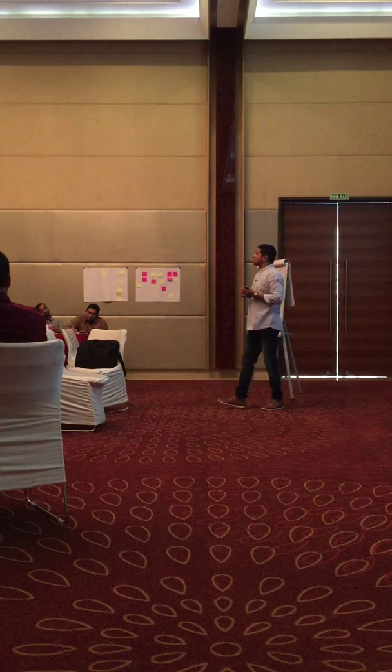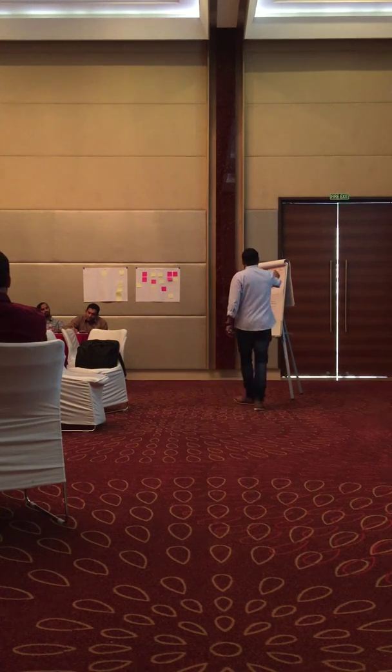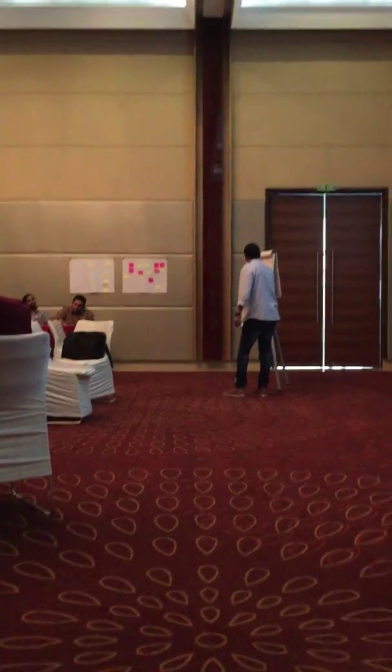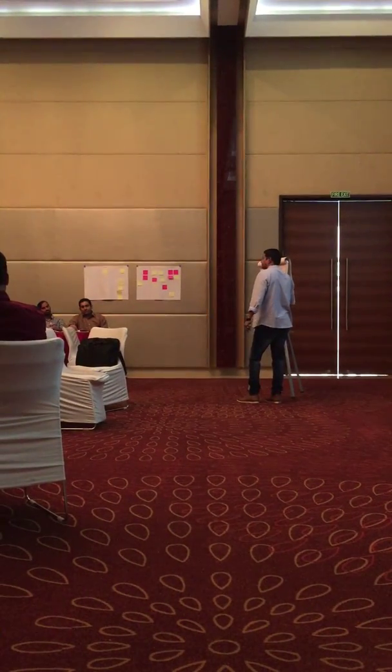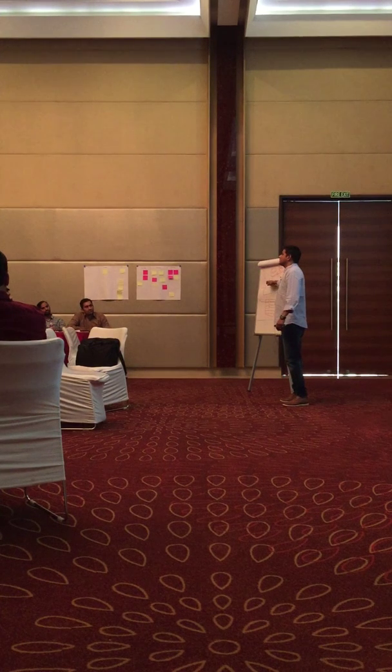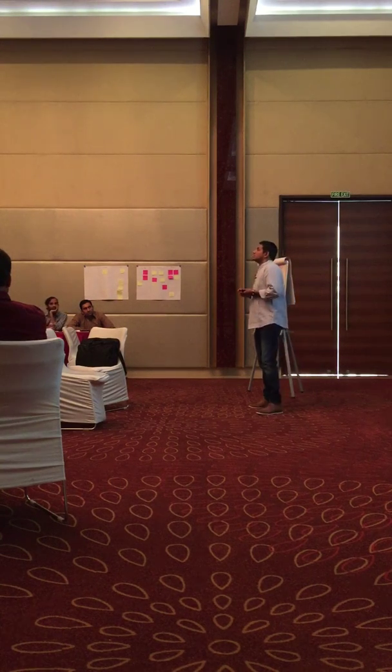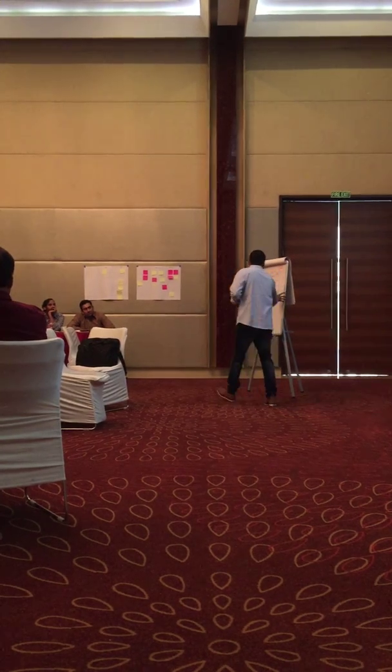Now to answer your question, Aparna, suppose this registration is 100 story points, then if you split into smaller ones, one may become 5 points, another may become 2 points, another may become 3 points, 8 points, like that. The sum of these may become 100 or a little more or a little less. But when you are doing the collaboration, some things you can ignore, right? There is a concept called sub-epic also. What is a sub-epic? Suppose I want to sort by something. The sort itself is big. Then you may consider it like this.